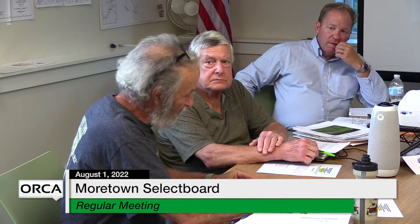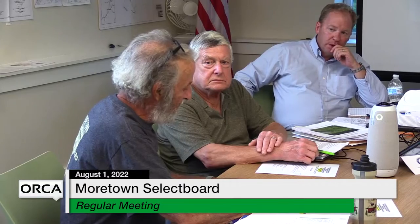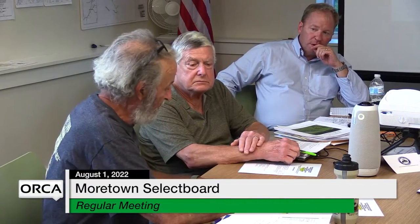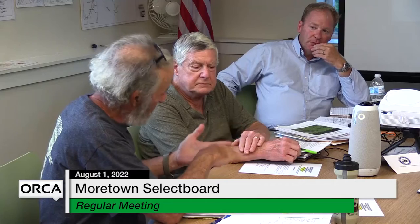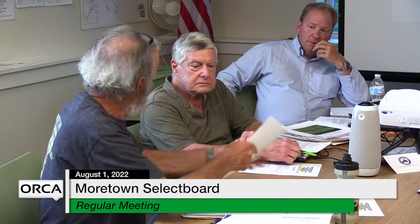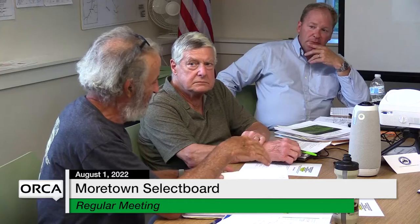Do you have a dollar amount? Yeah, I do. So we did this whole vetting process. We ended up with two proposals, one from Vermont Integrated Architects and the other one from Gossens Bachman in Montpelier and the other folks that are in Middlebury. We had four people, Clark, Corey, Collar, and myself, and everybody read it without looking at the proposals, and we did a scoring, a vetting system. And then we looked at the proposals.